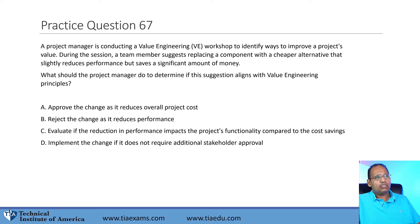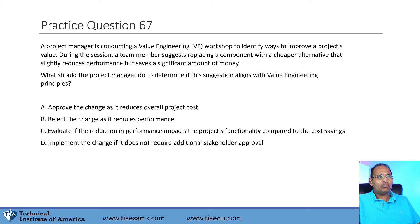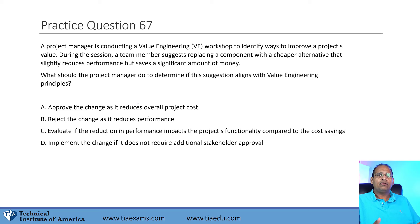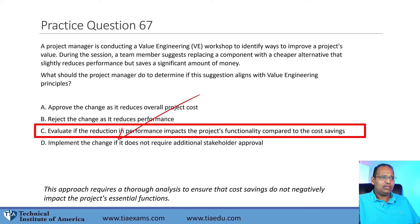Question 67. A project manager is conducting a value engineering workshop. A team member suggests replacing a component with a cheaper alternative that slightly reduces performance but saves significant money. What should the project manager do? A: Approve the change as it reduces project cost. B: Reject the change as it reduces performance. C: Evaluate whether the reduction in performance impacts project functionality. D: Implement the change if it doesn't require stakeholder approval. Use the mindset — someone is asking for a change. Never approve, reject, or implement without evaluating first. C is the best answer.